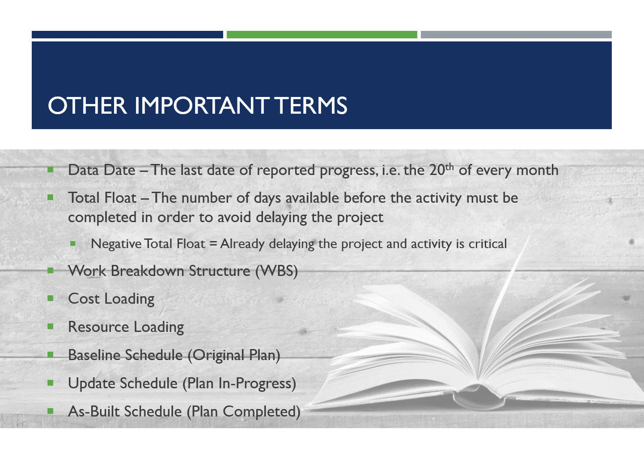And it helps not only to coordinate resources, but also to make sure that you have the amount of resource, whichever type of resource, that you need to complete the project. It can help you with forecasting. It lets you know, oh, I need that mini excavator out on the job site to complete 3 activities, and all 3 of those activities are going at the same time. So really what I need is 3 mini excavators, but I only have 1. And so if you only have 1, then you know that you need to stretch those activities out a little bit, and you can see how that might impact your schedule.